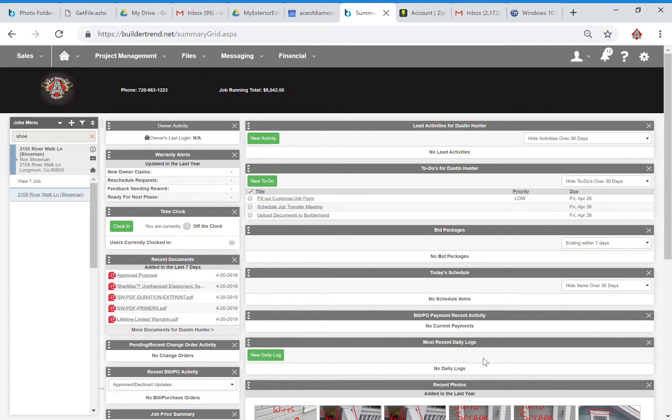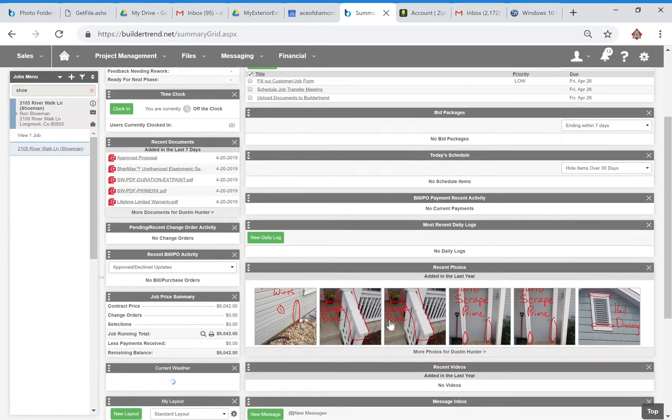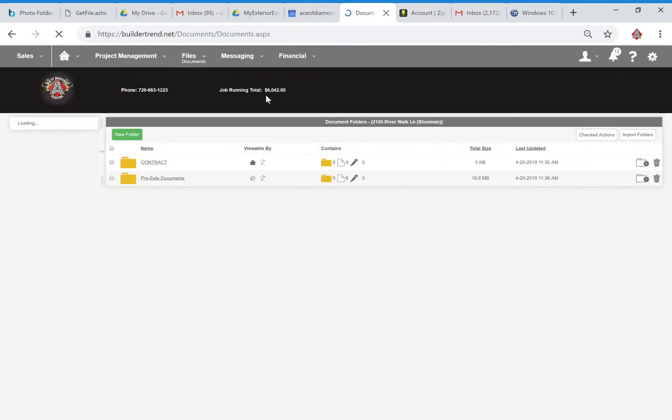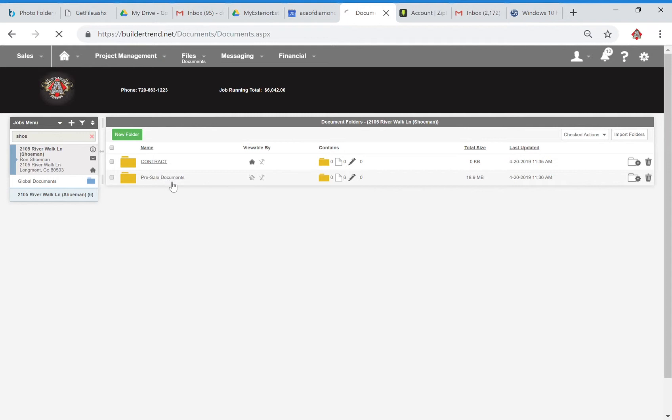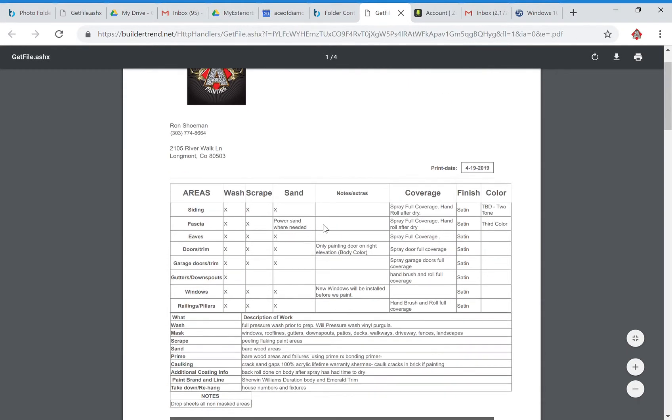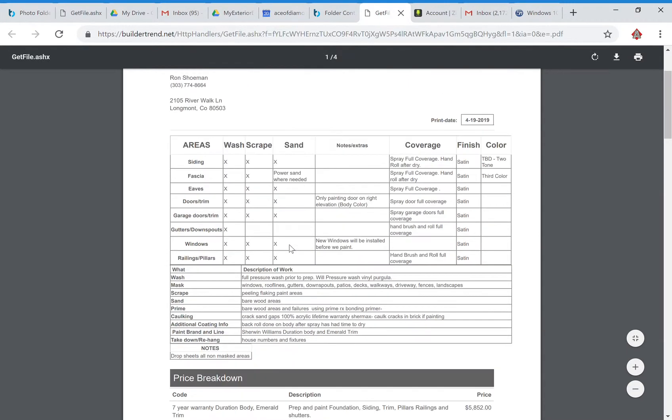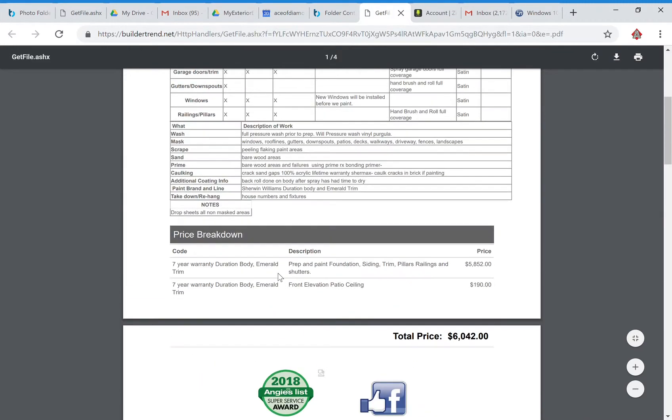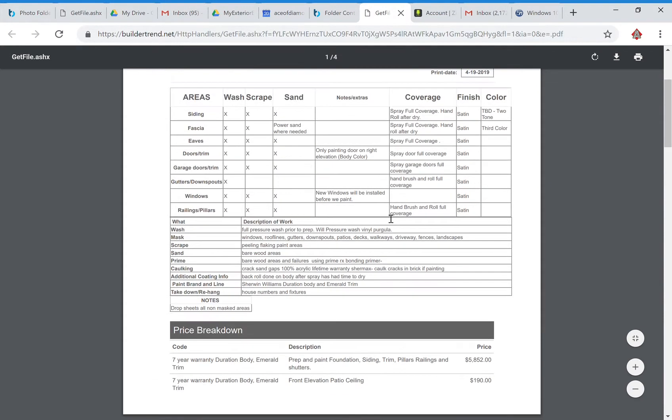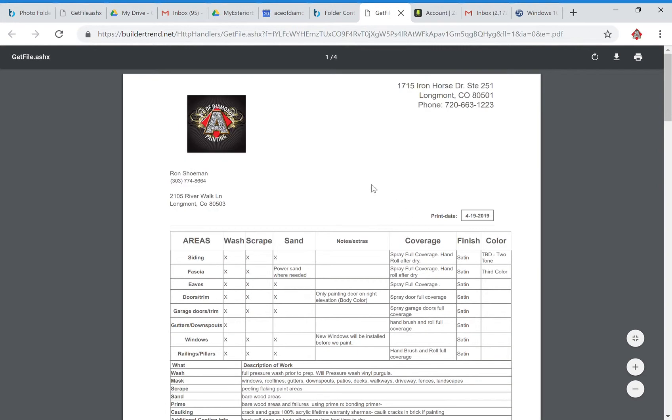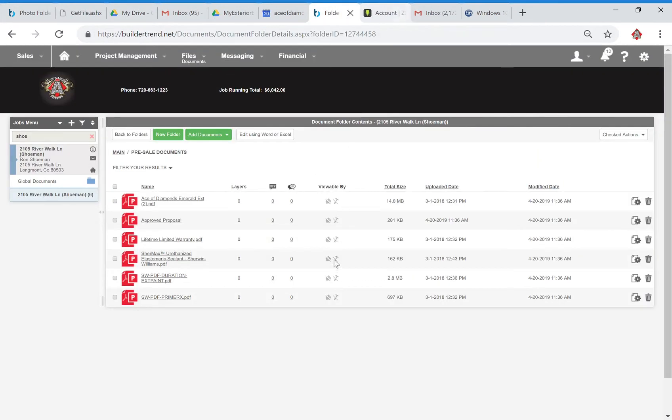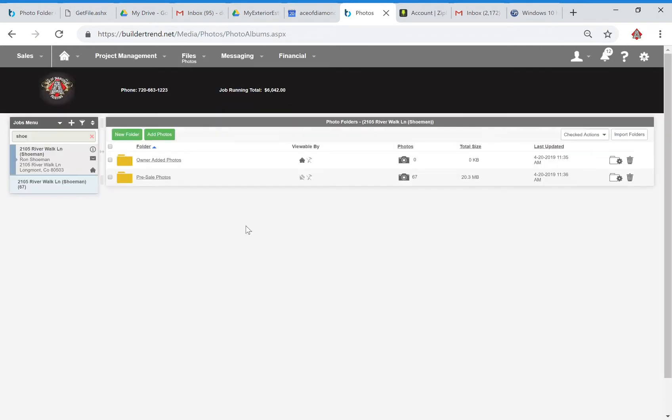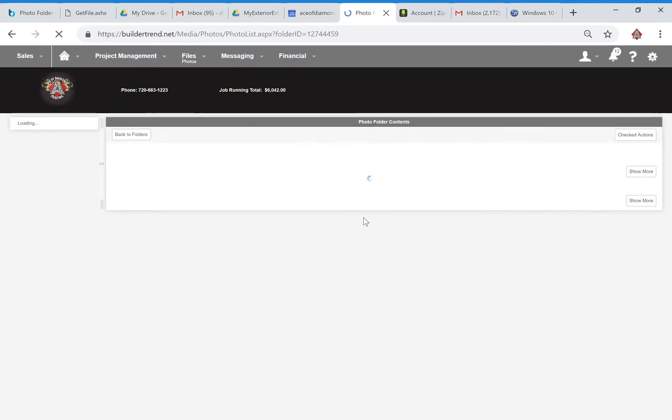You want to make sure first of all that your documents came over. So we have an approved proposal, let's go ahead and take a look at that in a new page just to make sure. Obviously this all looks good. Homeowners kind of approved everything. We've got a Duration body Emerald trim option here, so we're going to have to make sure that our project manager really knows that and has specific information regarding what's going to be Duration, what's going to be Emerald.